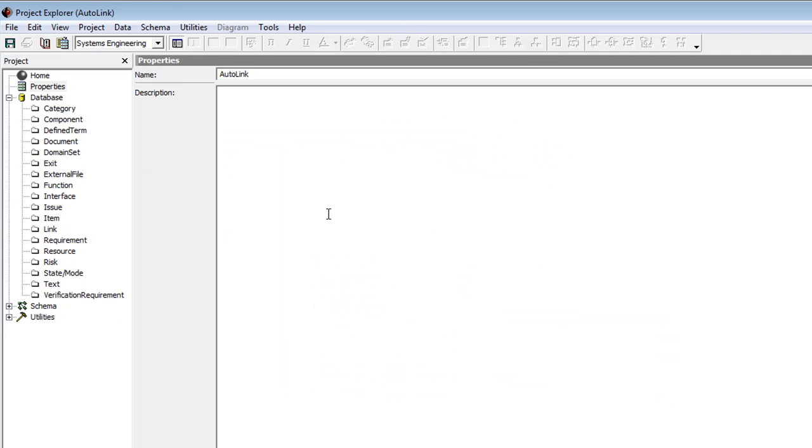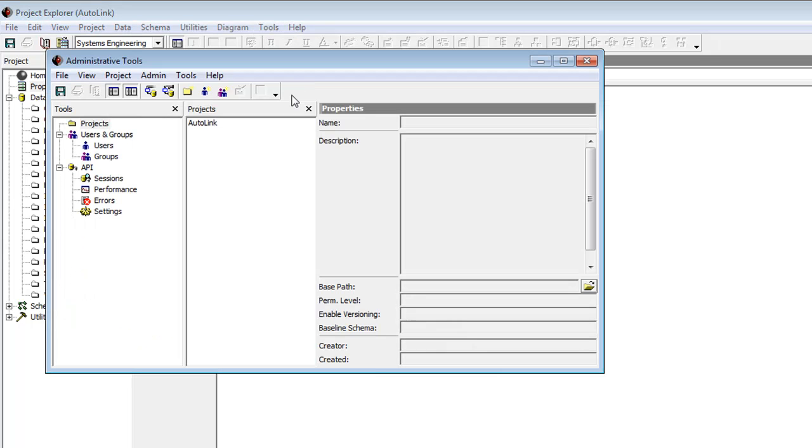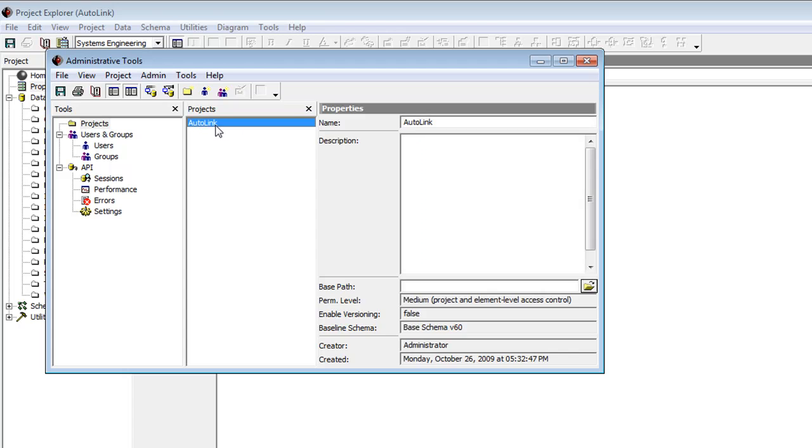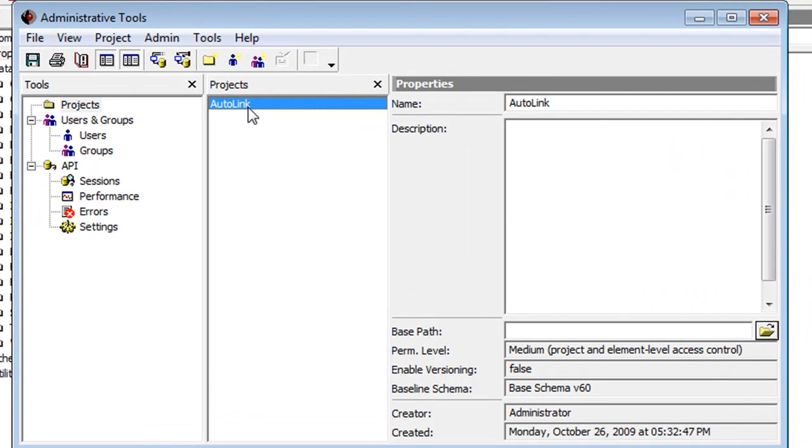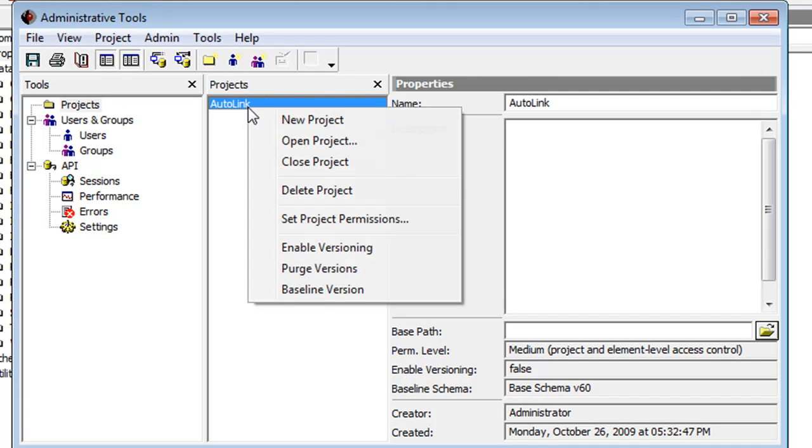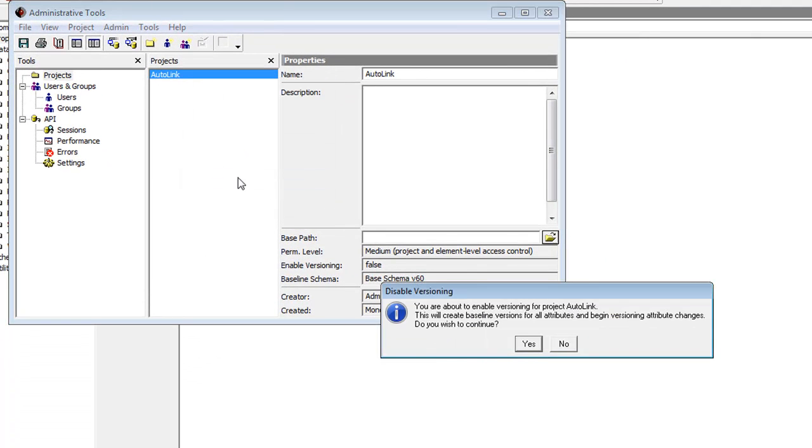After a project has been created, you can enable or disable versioning using the Administrative Tools. Click on Tools, Administrative Tools. Then in the Administrative Tools window, click on your project. Right-click on the project and choose Enable or Disable Versioning. Then click Yes.